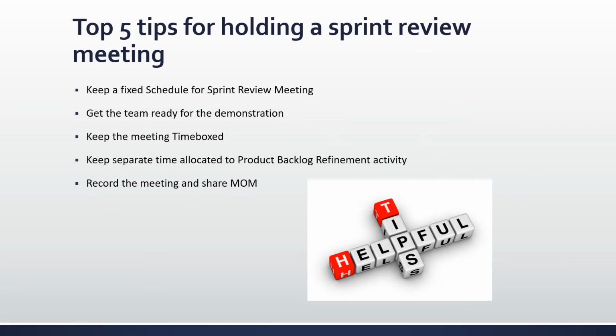So here are 5 top tips for holding a sprint review meeting. First, keep a fixed schedule for the sprint review meeting. The sprint review meeting is a time for delivery. It's the time when the product will be evaluated. It's very important that the whole Scrum team is informed prior to the schedule of the meeting. So the best practice is to schedule this meeting at the start of the sprint itself.